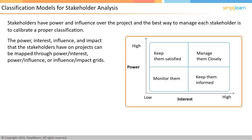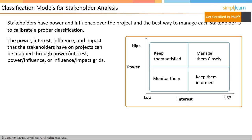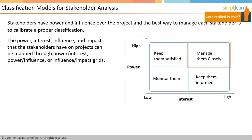The diagram on the screen has an x-axis representing interest level and a y-axis representing power level. Based on the various combinations of power and interest levels, the grid is divided into four quadrants. The stakeholders in the top-right quadrant, with high power and high interest, need to be managed closely — you have to monitor their involvement and engagement very closely.